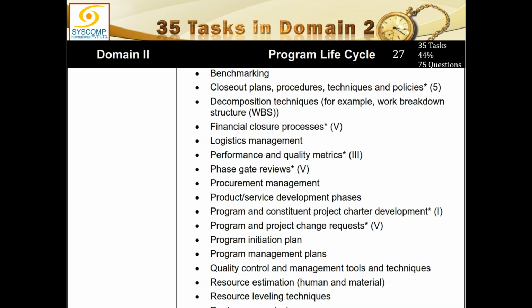And this is just a suggestion. If the program manager is satisfied that he has divided the work into projects, he may leave even the phases out for the project manager to decide. But the maximum you can go down in your WBS is projects and their phases, nothing more than that.